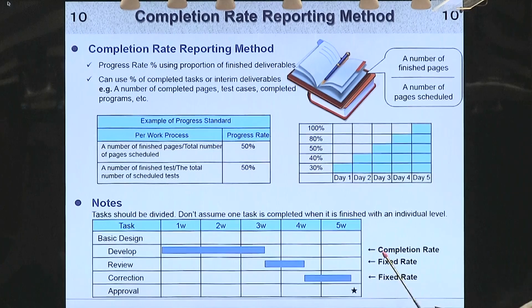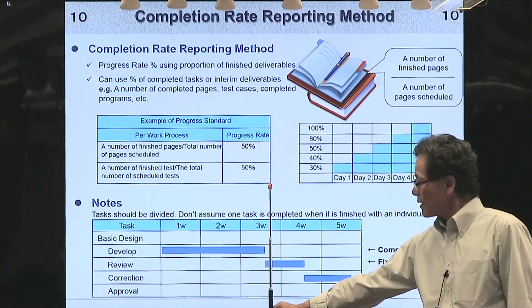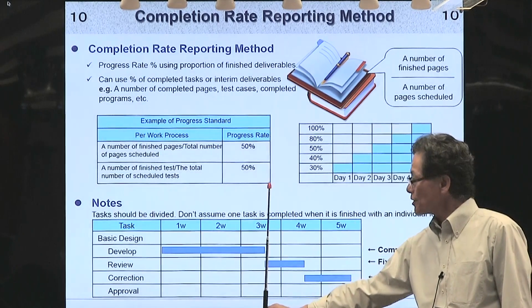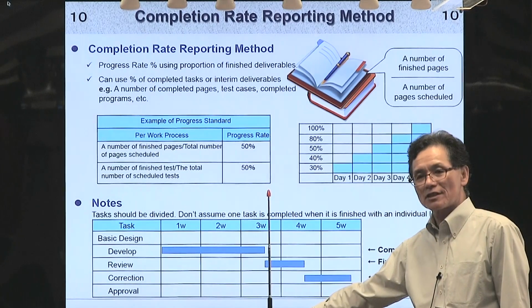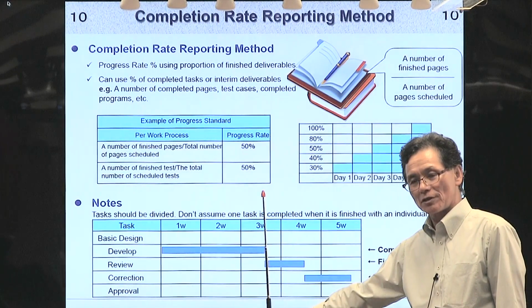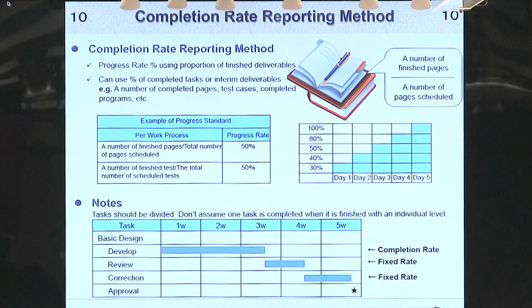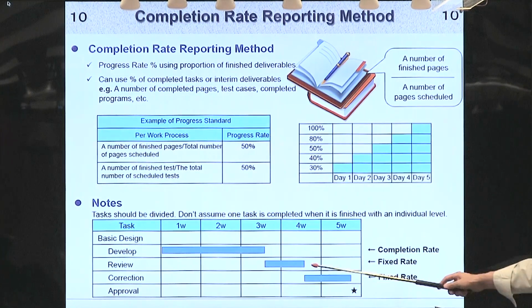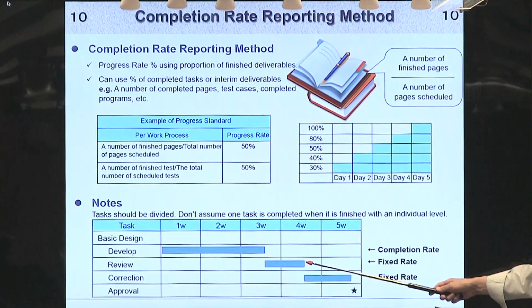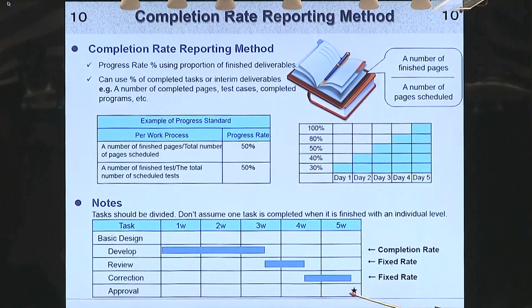So for example, if a member finished 100%, you can set that as 75% of the total progress. You can predefine it in the beginning. If you have a review, it can go up to 85. And if you get a final approval, inspection, then that's done, 100.